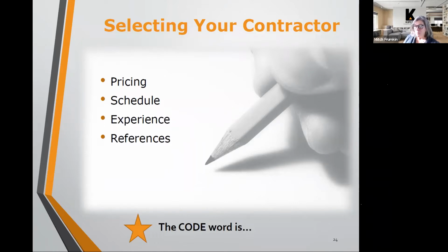There may be related projects that require permits. If there's any sort of additional work to the pavement project that involves constructing something that wasn't perhaps there before, that may involve some permitting. But when you are repairing or replacing something in kind, there's usually not a need for those sort of permits.